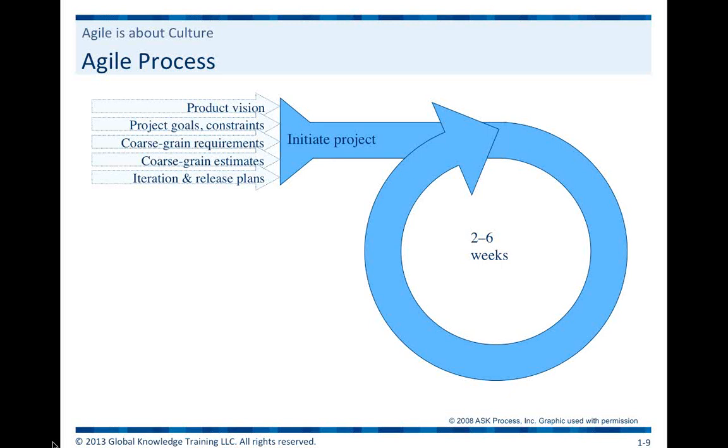Is that in Agile, project initiation lies at a level of detail that is explored as we go through the iteration or as we go through the sprint. So we don't necessarily do a whole bunch of pre-research and pre-analysis and then start the sprint. Because the Agile approach is designed to be tolerant of change, the lean principles of just enough and just in time are very much applied here. So you do just enough planning to get you to the next day, or just enough analysis or diagramming to get you to the next day.